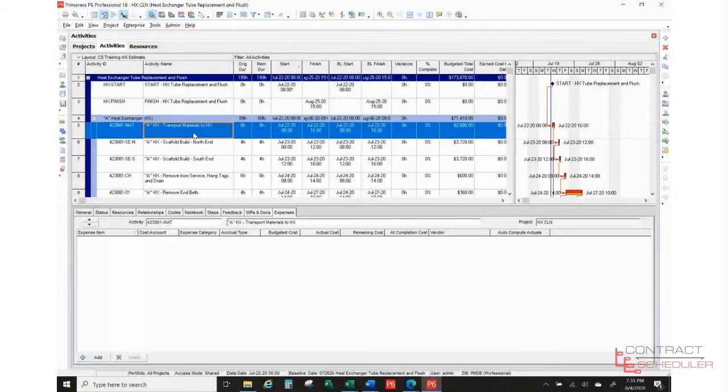In order to do this, I made some initial conditions, some assumptions. One is that I used generic resources. I did not use specific people. If you need to use a specific person, it's very important that you keep that in mind when scheduling, when it comes time to decide whether it's going to be task or resource dependent. So all of these use generic resources.